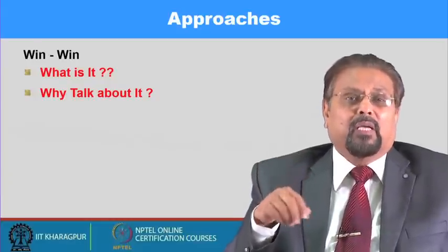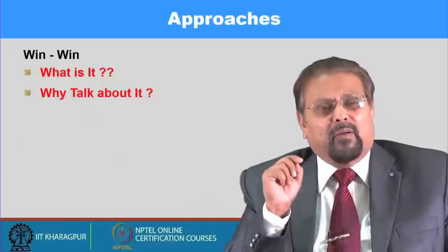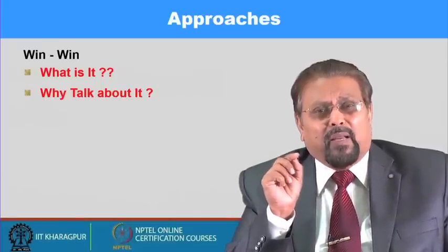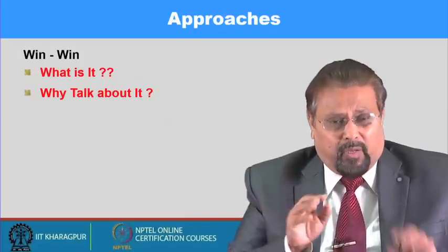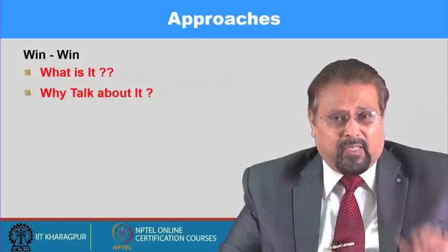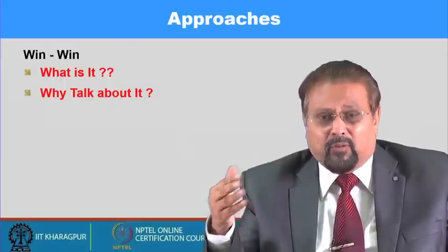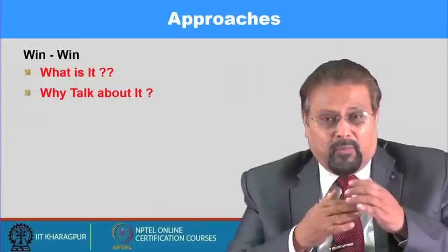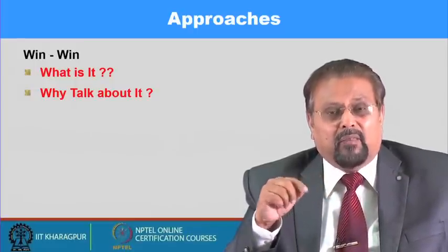In a tender process, everybody gives a quote. The quote is very, I would say, very finely worked out for any kind of work. The quote is worked out: okay, we are going to spend this much on these things. We are going to make this much profit. This is the amount that you have to share with others. These are the different kinds of taxes we have to pay. So ultimately you say this is our rate. You work it out, and then you quote.